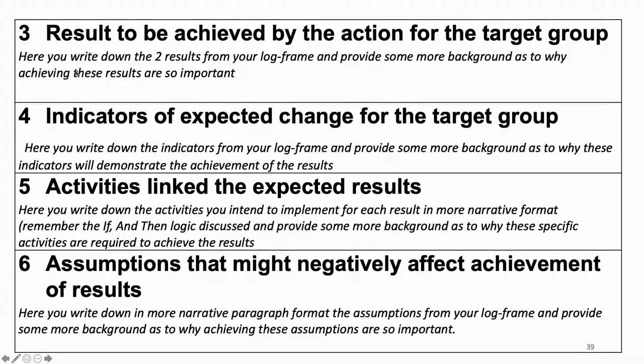You can also here, to demonstrate insight in your assumptions and challenges, propose some mitigation measures. If the conference venue is not available, these are the measures we will implement. If the season or the weather would not allow, these are the types of things we could do.